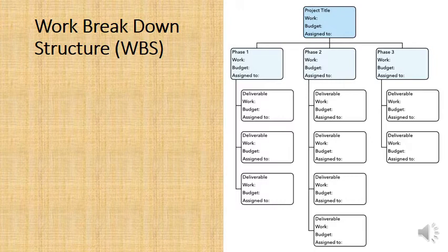And the final thing is you need to resource that work package. What do we need to achieve this work package? What sort of engineer, what sort of specialist will achieve this work package? Who will be responsible for it? Also, you may want to include what sort of resources they need for achieving this work package. Is there any amount of equipment or machinery that is required? Do they need software for the design work, or various other things? That is a typical work breakdown structure.